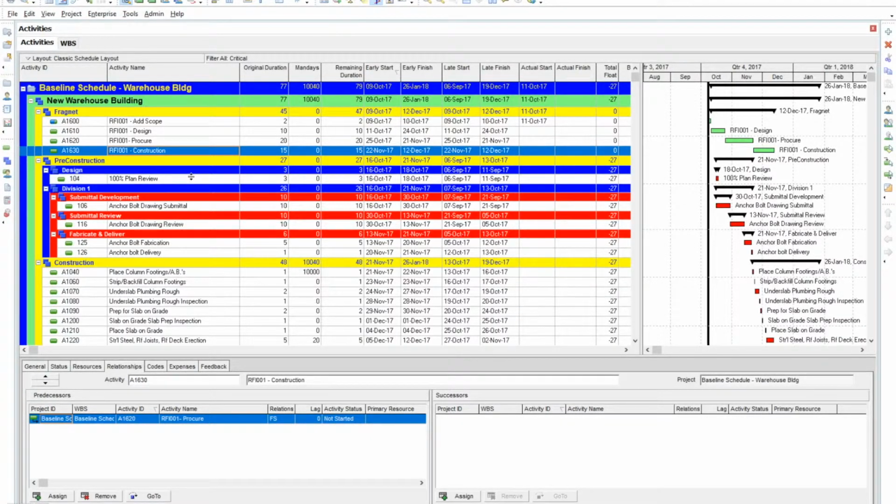Well, if you know you're going to get it back from the government or the client, you should subtract it. The entire point is that you don't want to ask for it twice. But in this scenario, we said that we own that 27 days of negative float.